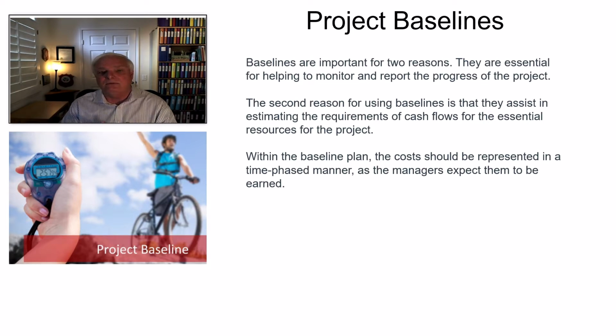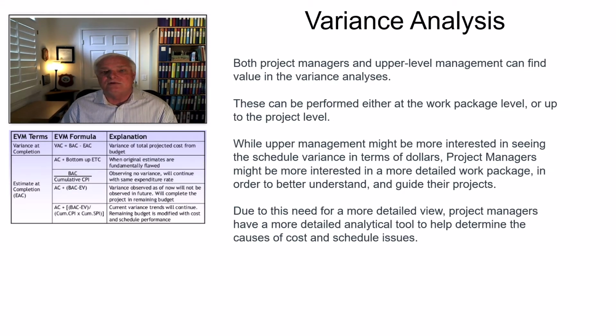And sometimes projects become so far entrenched into the negative that the data just doesn't make sense to continue looking at it. It may mean that you will be asked to come back and create a new baseline. We are going to re-baseline the project, and typically when that happens, new management is put in place, somebody new takes over the project, and they're given the opportunity to continue moving forward with it.